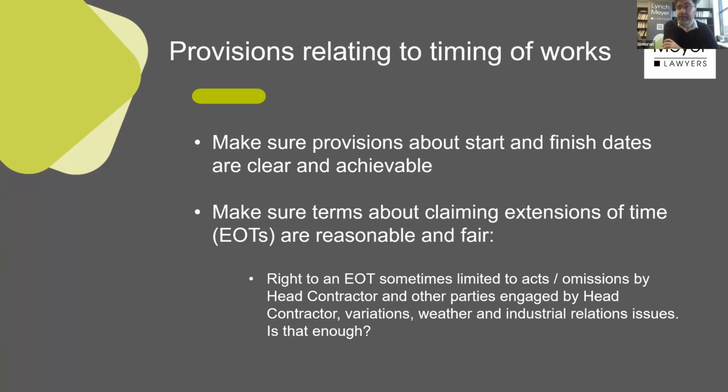But from my perspective, there needs to be a little bit of space in the program in case things go a little bit less well than planned, because we all know in the construction industry things never go exactly as planned, and there's always some delay, whether it's your operations manager quits, or Trump sticks tariffs on China and you can't get materials, or you have COVID, and I read about bird flu. I sometimes have to reinforce this